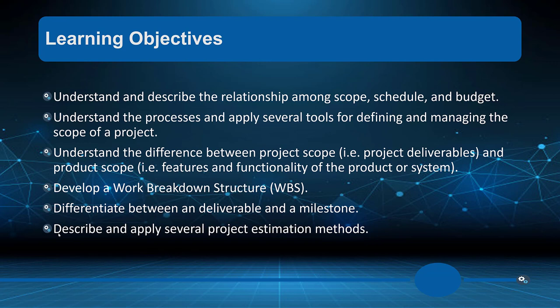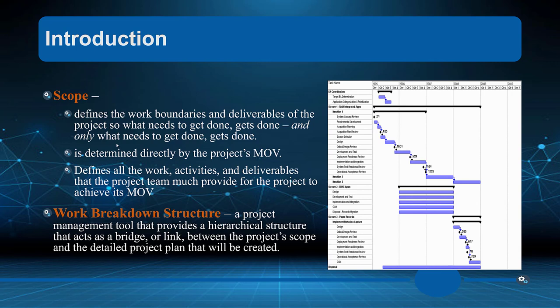We'll look at the relationship between scope, schedule, and budget — everything plays together. We'll look at how to create a work breakdown structure, break it down into individual packages, and examine milestones. A milestone isn't just reaching an outcome in a project package; it means our governance committee or an independent party — including internal or external customers — signs off on the work.